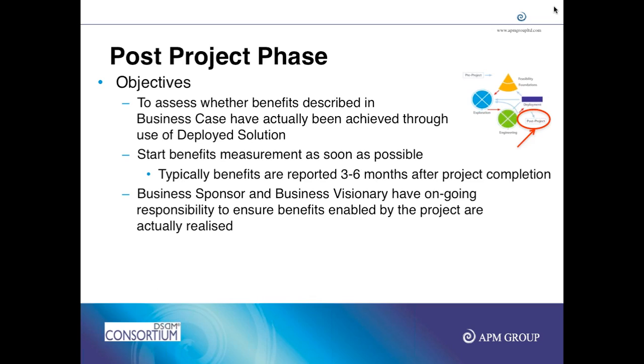One example is one of my customers in the UK. They decided to offshore some of the application development. It was supposed to be done in 6 months. So we did the offshoring of the application, and 6 months after the project was over, a review was conducted to see how offshoring has actually helped the organization. Did it bring more flexibility and scalability of resources? Did it help to save costs and get more functionality developed for the same cost? Now, this is benefit realization.